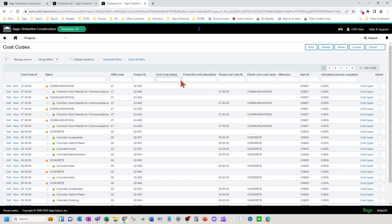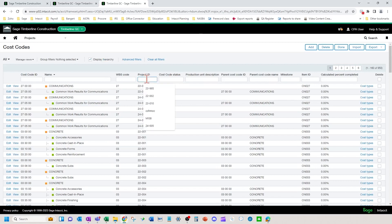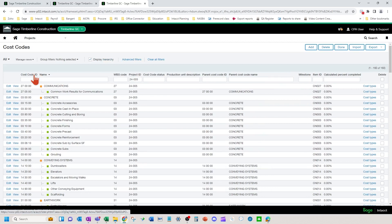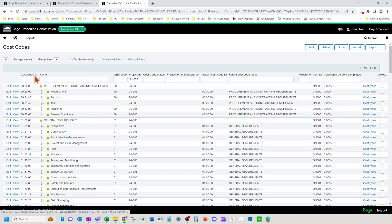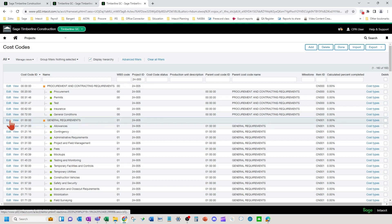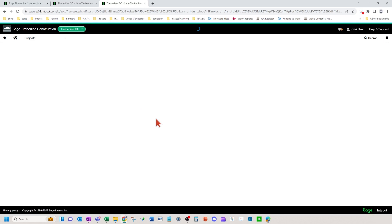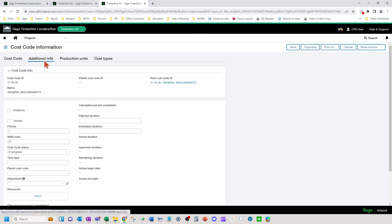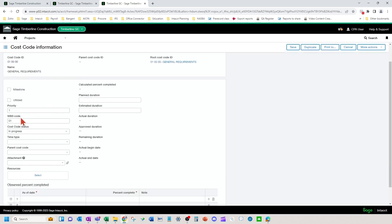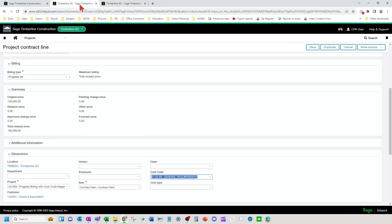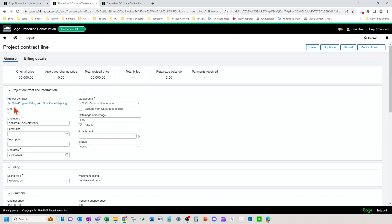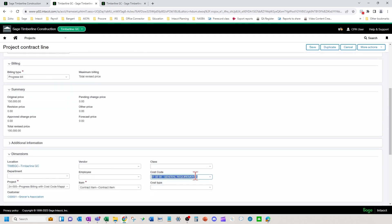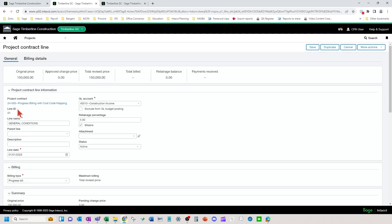And on that 010000 general requirements parent cost code, I'm going to put a WBS code of 01. The WBS code stands for the schedule of values line number. So 01 here, you're going to put the WBS code on. Then 01 cost parent cost code, which has that WBS code on it of 01, it's going to match up with your 01 line up here. So whatever cost code you pick down here, you want it to match up with your line on your schedule of values.